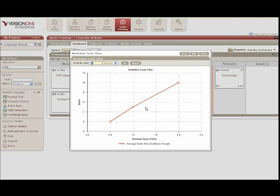For teams doing Scrum or XP, this is also useful — what Mike Cohn calls triangulation. Some people have problems with the story point concept. If we look at a story point and we know a one is about an average of five days, that can help speed up the estimation process. Sometimes estimation sessions go on and on — but if we have an understanding of about how many days a one-pointer takes, that gives us a little more information to speed that process up. There are a lot of uses for cycle time — I'd look at it as velocity per feature per estimation level.